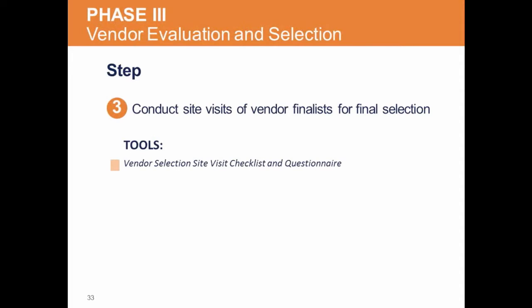You should include the following steps in the final selection process. Gather the organization's decision makers and review the scores. Discuss additional considerations and gather any additional questions for the vendor. Compare the request you made in your RFP with vendor responses. Contact the vendor finalist with any questions or concerns. Review additional information with the selection team. Then select the top vendor and consider selecting a runner-up as a contingency.